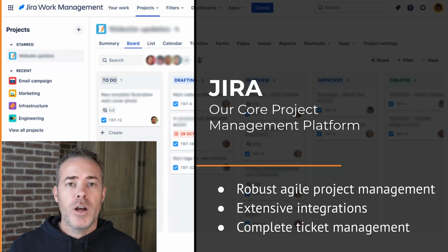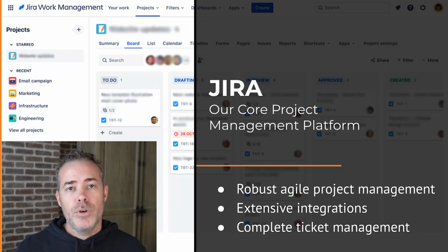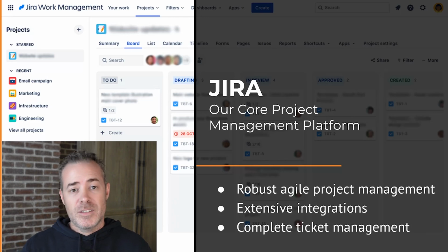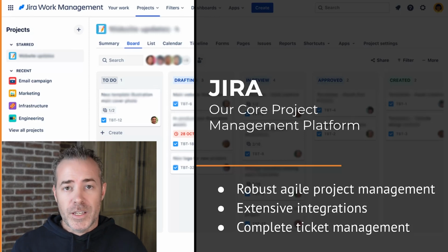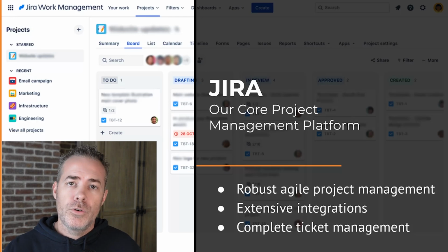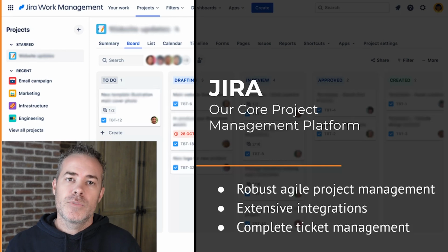And then part of the process typically is that you're constantly grooming that backlog. So as you add things to it and you're planning, you're detailing it out, you're adding things like your test scenarios, acceptance criteria, estimating, whether you're doing that estimation in story points or in hours. You can put all that in Jira. And then you can associate those items with epics.